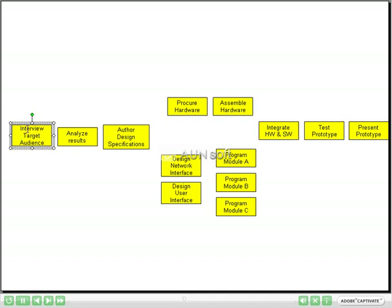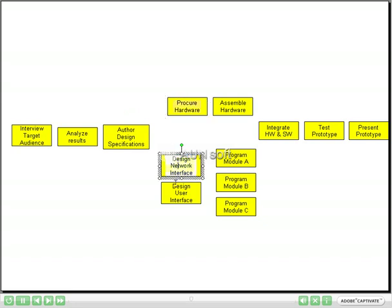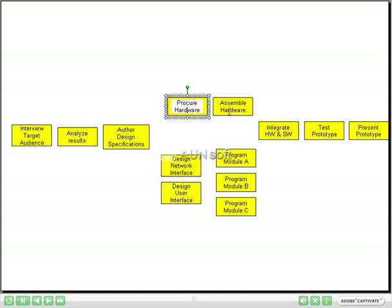So the first thing we are going to do is interview the target audience. Once we have done that, we can analyze the results. Once the results are analyzed, we can author the design specifications. Then two things can happen: we can start to procure the hardware and do the network design and user interface. Now once we have procured the hardware, we can assemble it.